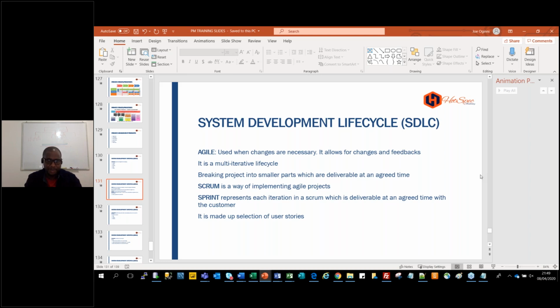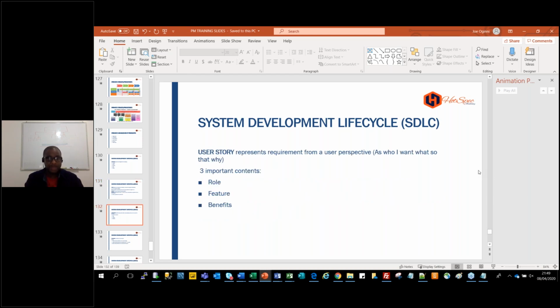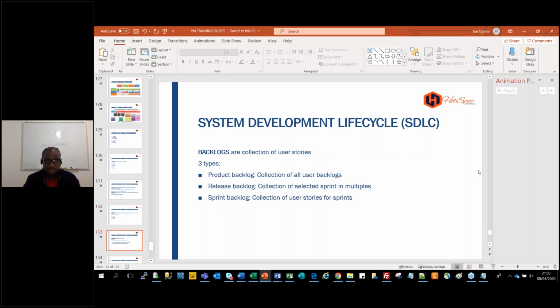And once you're delivering that sprint, you need Scrum as a process. On a daily basis, the daily stand-up asks 3 questions: what was done yesterday? What do you plan to do today? Are there any difficulties that you had yesterday or you're going to have today that could delay you from delivering what you intend to do? So those 3: what you did yesterday, do you have any issue with it, anything that needs to be answered? What do you plan to do today? What would delay you from delivering it? Simple, 15 minutes, done. And that is Agile for you.